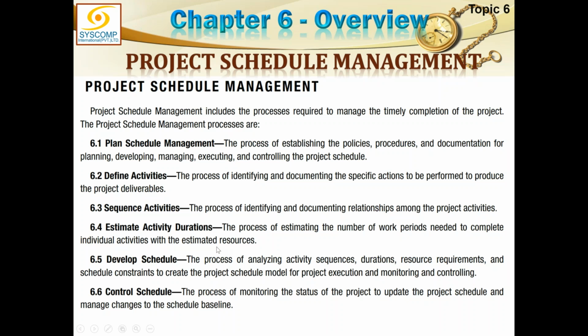And if I know the resources, I can easily estimate how much time I will need to complete this job. So activity and resources go hand in hand. Time may impact the resources, or the resource estimate can impact the schedule estimate. So activity durations have to be estimated here, and naturally, sometimes the third estimate. There are three types of estimate: duration estimate, cost estimate, and resource estimate. All three estimates work together and affect each other.